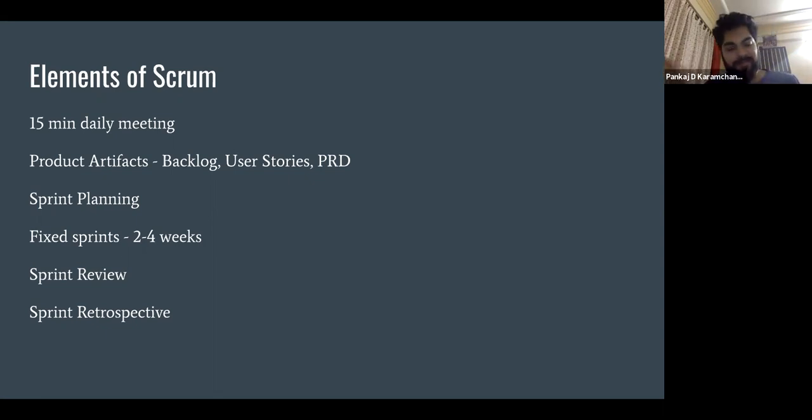So for example, if you have a few developers, then your bandwidth is depending on their hours, right? Say it's 3 developers and they put in maybe, let's say, 8 hours every day or 40 hours a week. If we talk about a 2 week sprint, it's 80 hours. So for 3 developers, you have 240 hours of bandwidth, right?